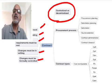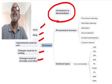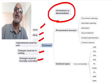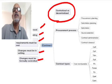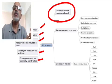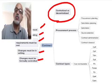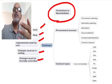During contracting, one key decision is to make it centralized versus decentralized. In a distributed project, sometimes we procure material centrally and then distribute. Sometimes we allow different geographies to procure locally, and sometimes it can be a combination — high value items procured centrally and low value items procured locally. Both approaches have their own merits and demerits.